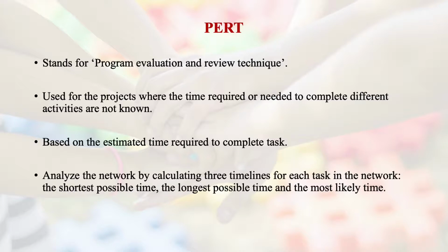We analyze the network by computing 3 timelines for each task in the network: the shortest possible time, the longest possible time, and the most likely time.